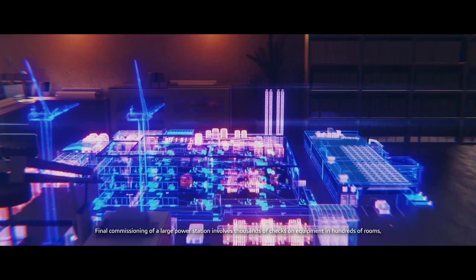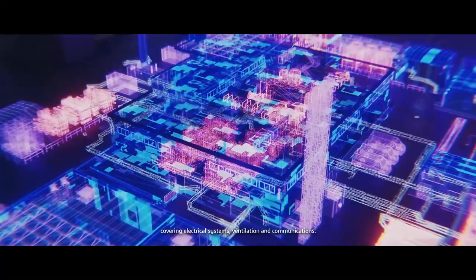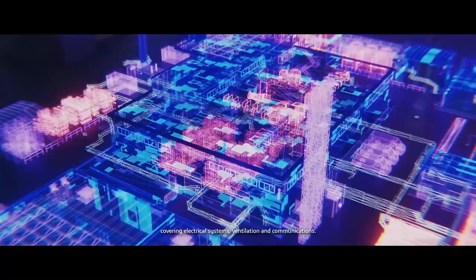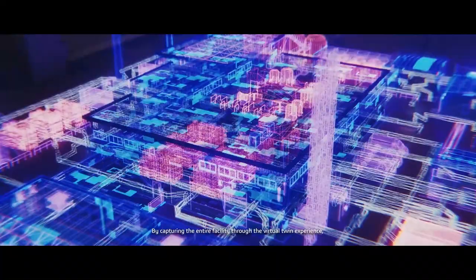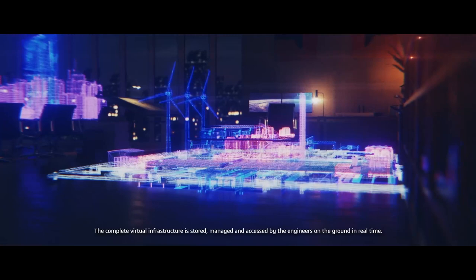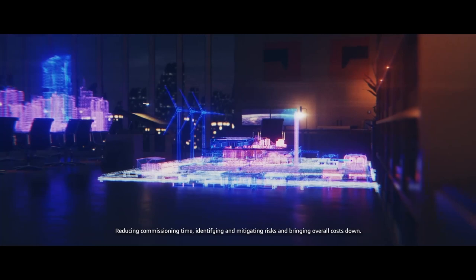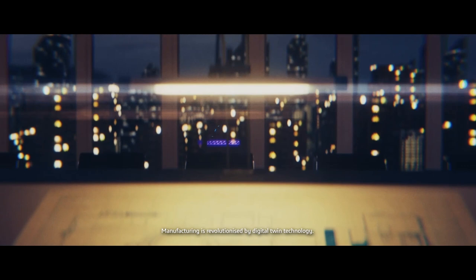Final commissioning of a large power station involves thousands of checks on equipment in hundreds of rooms covering electrical systems, ventilation and communications. By capturing the entire facility through the virtual twin experience, our clients generated a fully digital commissioning procedure. The complete virtual infrastructure is stored, managed and accessed by engineers on the ground in real time. Reducing commissioning time, identifying and mitigating risks and bringing overall costs down.